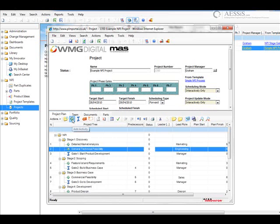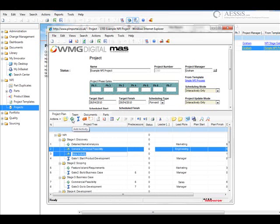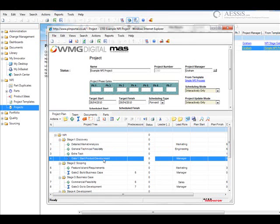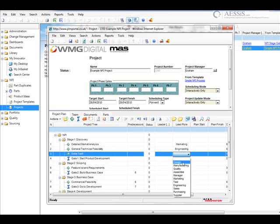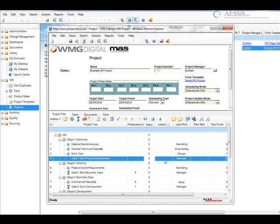Although the project was created from a template, we can go in and edit, add tasks, delete tasks, and fine-tune it to our specific project needs. We have to make sure we add a function or a role to each of the tasks.